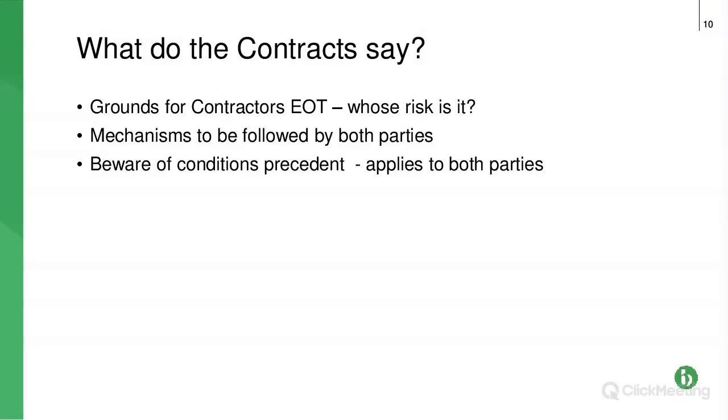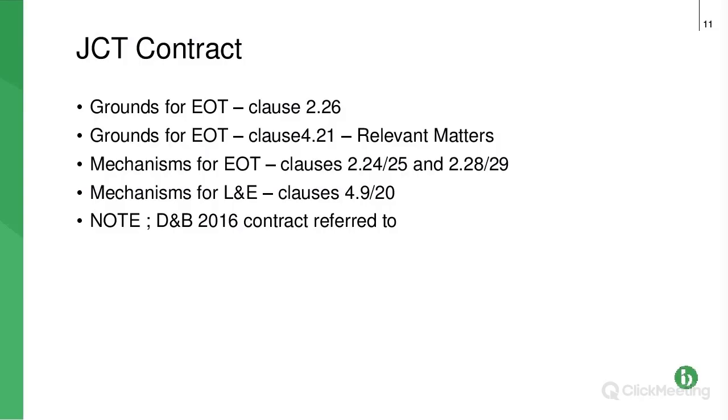Just note, beware of conditions precedent. I probably refer to these in every webinar that we have. They're tricky little clauses, mainly impacting on you making these claims, because they effectively say that unless you make these claims within certain time scales, your right to extra time and extra money is zero. So make sure you know what notices you need to issue and that you issue them on time.